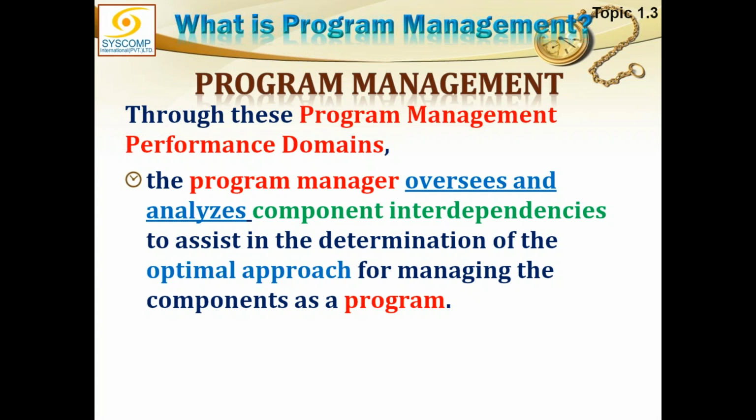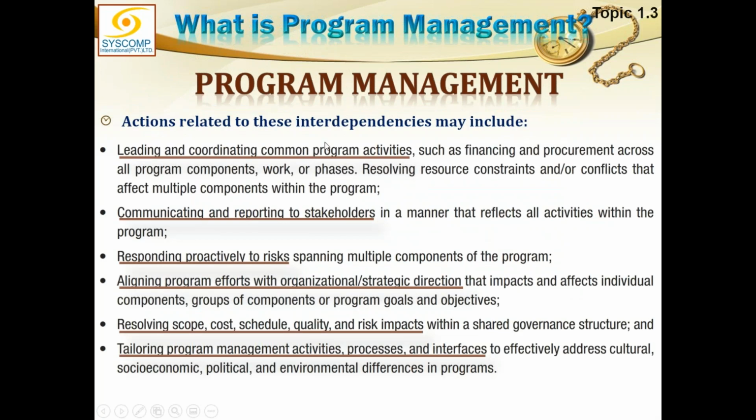Program is a big concept. If you're trying to manage the program, then you have to do a lot of tuning up of all these components. Actions related to these interdependencies may include, number 1, leading and coordinating common program activities, such as financing and procurement across all program components, work or phases, resolving resource constraints or conflicts that affect multiple components within the program.